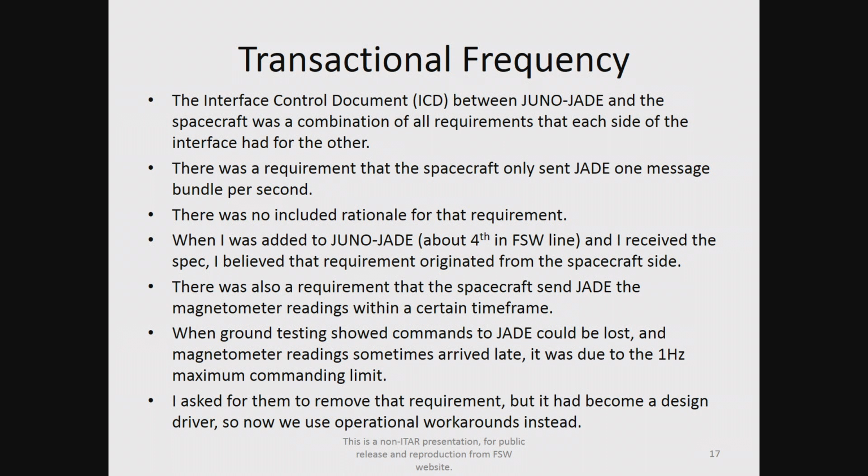When I was put on the project, I was the fourth or fifth person in line going into software. And so I thought they came up with this requirement. They later told me that it came from the JADE side. It may have, but there is no record as to where it came from. If there had been some notation that this came from the JADE side, I could have come back and said, no, this is not applicable to us, get rid of this. Or if there had been a rationale saying something like JADE can handle 1 command per second, I could have said, no, we can handle 100 commands per second, get rid of this. So we ended up having an operational workaround and everything was okay for this.